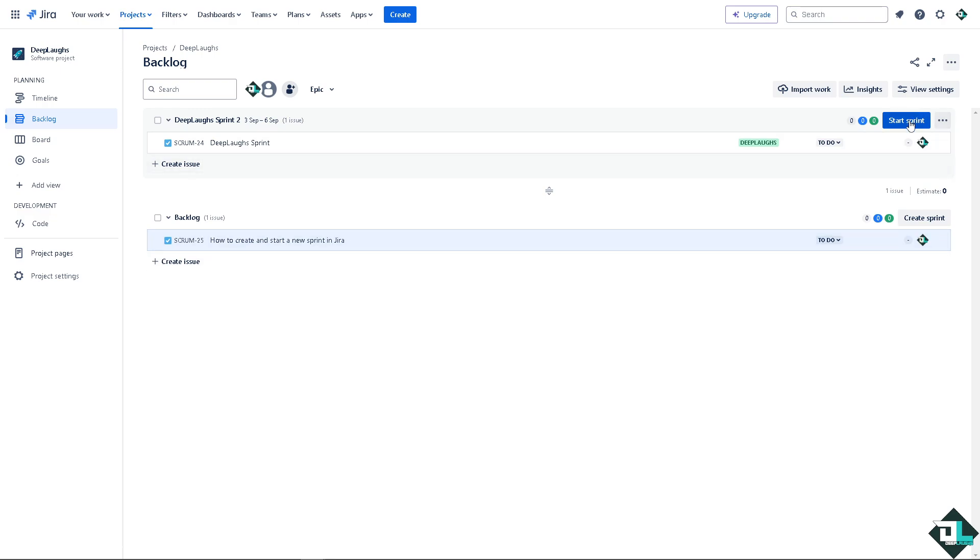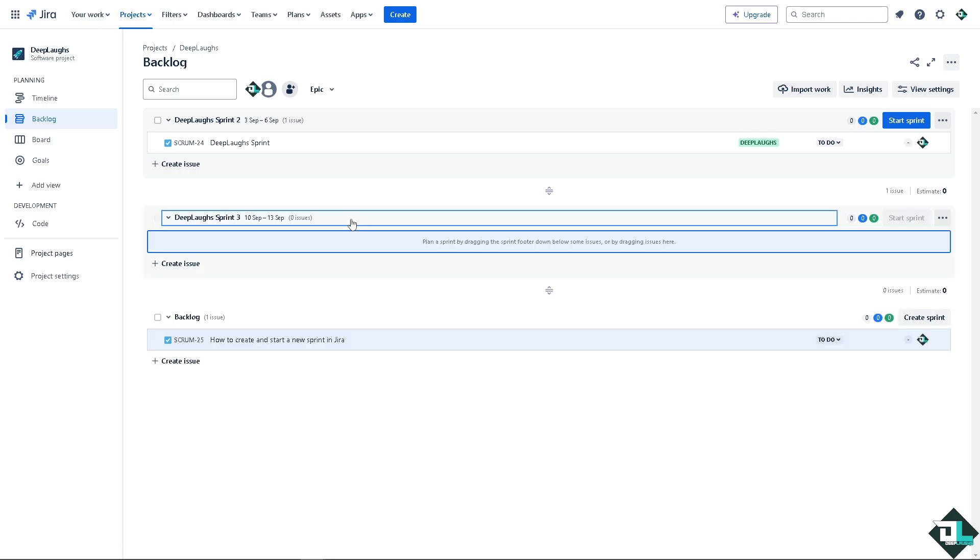So I have a sprint here already but if you want to create a new sprint from scratch, just look at the create sprint button and that's going to be this one. It's usually located above the backlog issue list.